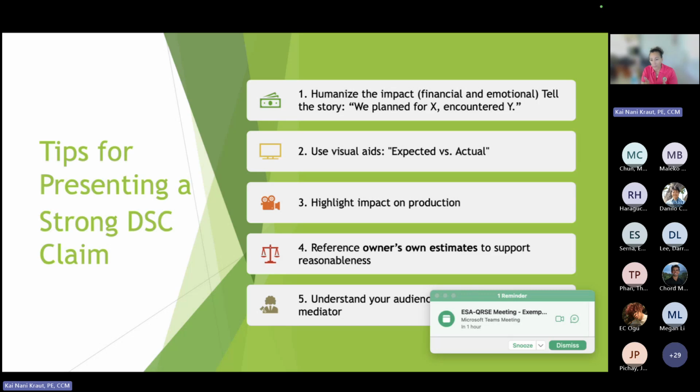If the contractor's bid aligned with all the other bids and the engineer's, then everybody kind of made the same assumption, because the analysis of the bids shows there wasn't a huge difference in cost. So that's one way to justify our position, saying, wait a minute, you guys are in alignment.